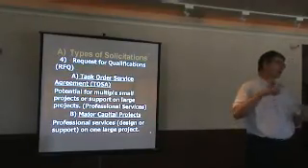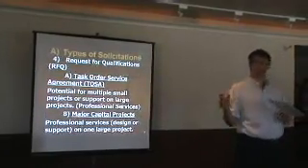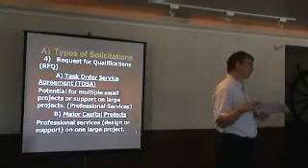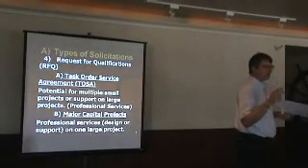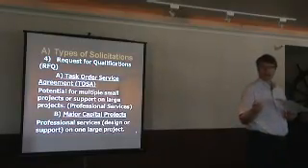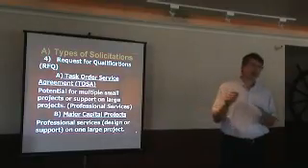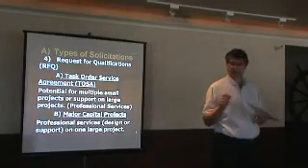It allows us to use somebody piecemeal from time to time. If you're selected under this RFQ selection process, where you're not bidding a price but providing rates, as well as skills, resumes, qualifications, and experience, you're guaranteed exactly $0 worth of work.